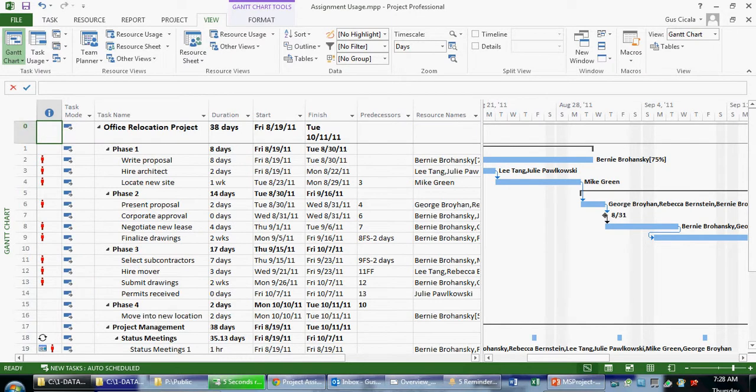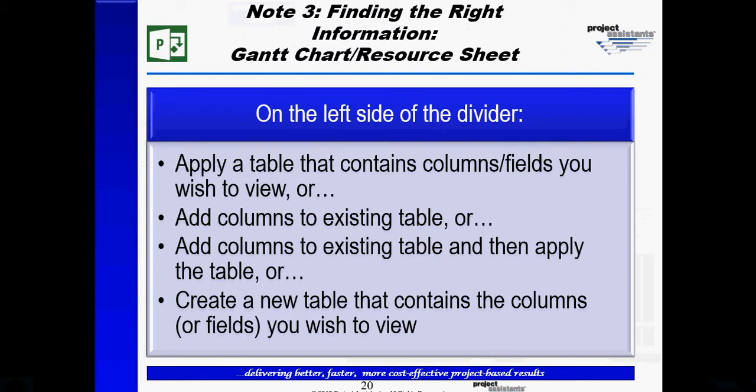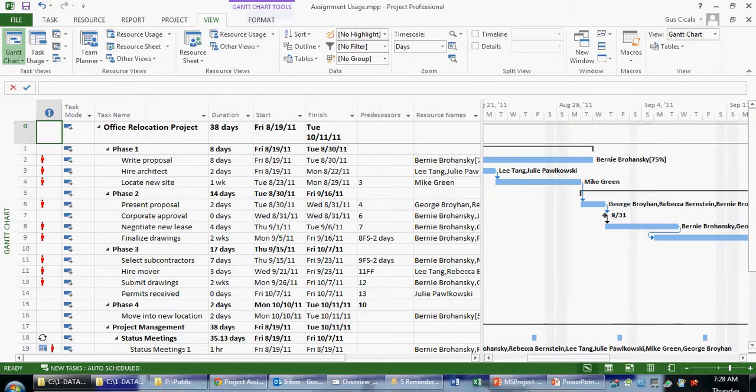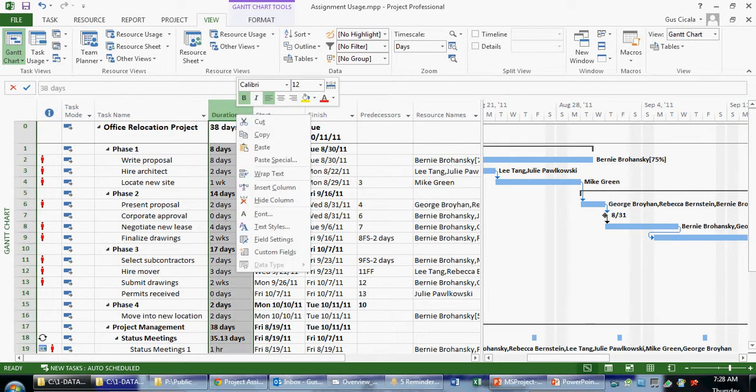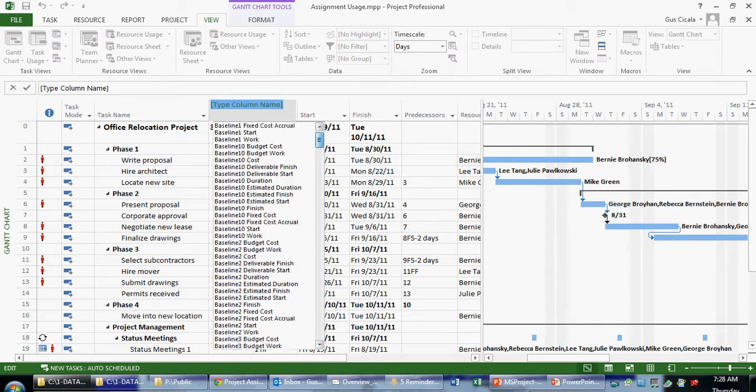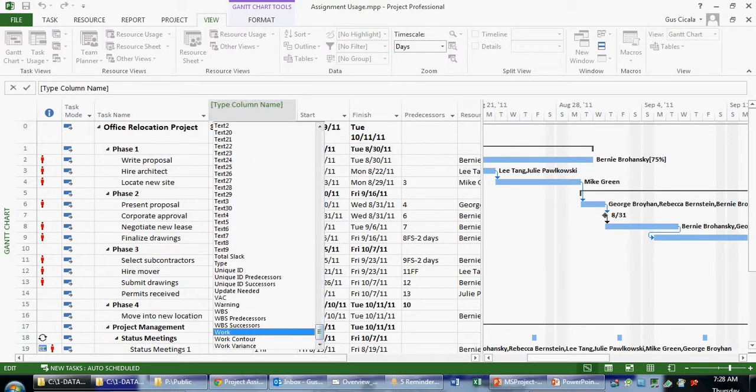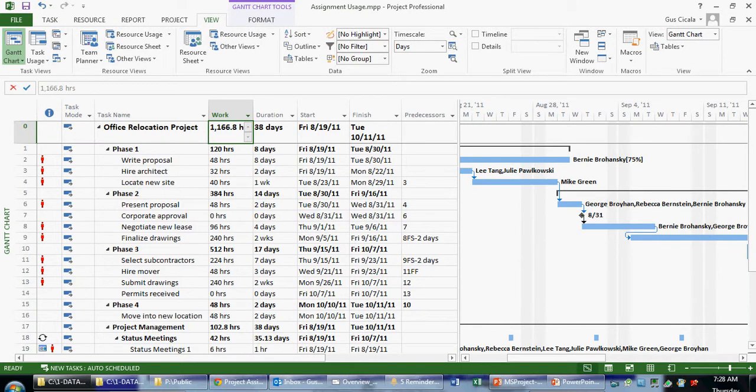Okay, so we see the entry table showing here. And again, one of the options we said in note number three was, I can add a column to an existing table. So I'm in the entry table. If I wish, I could right mouse click on a column heading and choose insert column. And in this case, I can scroll down to the work table, to the work field.